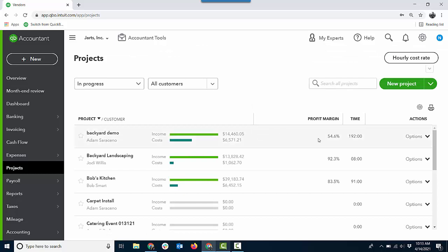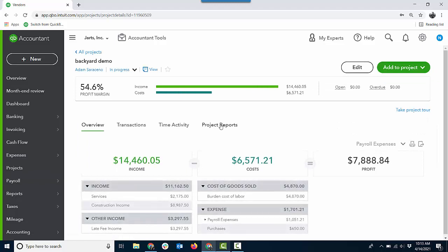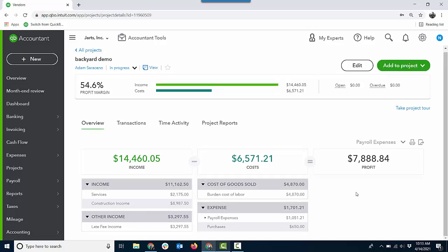And then finally, you just do the final invoice against the estimate, and go look for my progress invoicing video for that. And that's how you keep track, not only of your projects, but the profitability of each project using project reports, time in process or construction in process or WIP report you have based on the time. The time goes to the payroll, and it now shows up as part of your cost. And then you're invoicing against the estimates. I mean, you're just doing job costing. We call it project tracking in QuickBooks Online. You don't need to use sub-customers anymore, particularly if you want payroll to be included in the reporting. Use project tracking. And that is project tracking in QuickBooks Online.